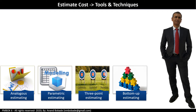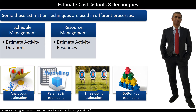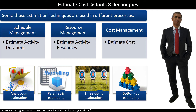Some estimation techniques are used across different processes. In schedule management's estimate activity duration process, analogous estimating, parametric estimating, and three-point estimating are used for duration estimation, and bottom-up estimating for aggregating durations per WBS. In the estimate activity resources process, analogous and parametric estimating are used to estimate the number of resources required. Bottom-up estimating is used for aggregating resources per WBS. Note that three-point estimation is not used during resource estimation.